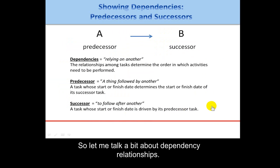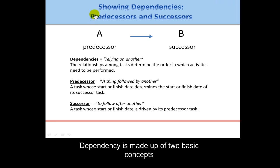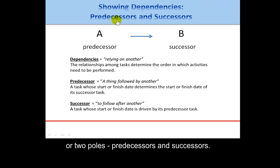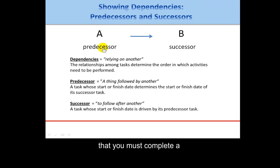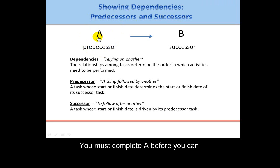Let me talk a bit about dependency relationships. Showing dependencies is made up of two basic concepts or two poles: predecessors and successors. Think about it this way — you must complete a predecessor activity; you must complete A before you can do the successor activity B.